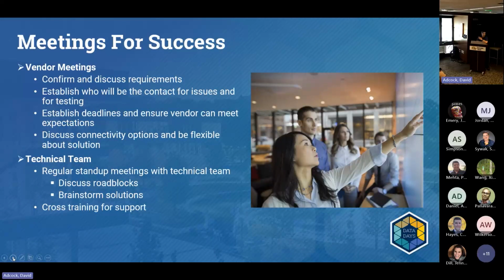And finally, we cap off the projects with a project review. In those, we discuss the lessons learned, and then we update our process using those lessons learned. Of course, that's a pretty critical process. Joe showed earlier our development steps document. We update and change that all the time based upon our lessons learned, how we've changed our processes. We update, we add steps, drop steps off, and it's a living document. And most of the documents we've created are living documents, which I think is pretty critical to our process.